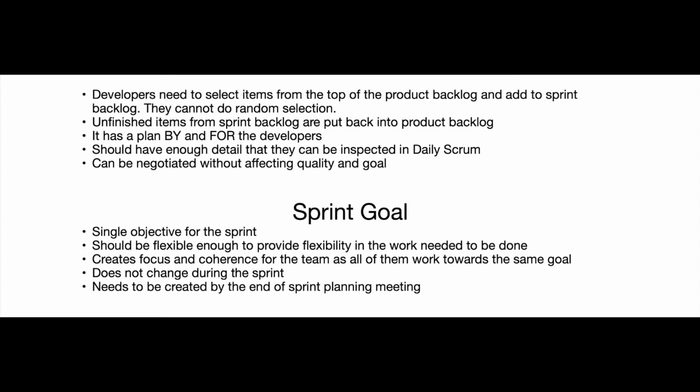Sprint goal, a single objective for the sprint, should be flexible enough to provide flexibility in the work needed to be done. It creates focus and coherence for the team as all of them work towards the same goal. It does not change during the sprint. It needs to be created by the end of the sprint planning meeting.